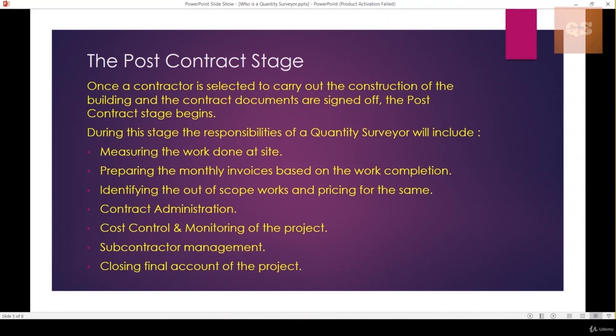The Quantity Surveyor in the post-contract stage starts their duties, which include measuring the works done at site on a monthly basis, preparing monthly invoices based on work completion, and identifying out-of-scope works and pricing for them. No project works out exactly as the initial design; once the project commences there will be changes and modifications. The Quantity Surveyor needs to identify if a modification is a cost addition, whether it is within scope, and price any additional works accordingly.